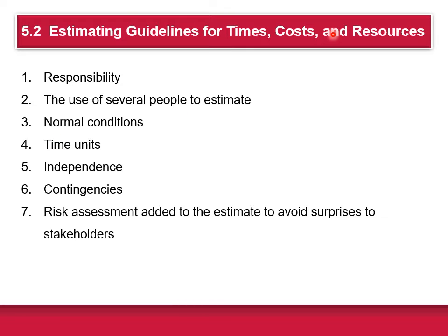Fourthly is the time units. Specific time units to use should be selected early in the development of the project. All time estimates need consistent time units. Estimates of time must consider whether normal time is represented by calendar days, work weeks, person days, single shift, etc. In practice, the use of work days is the dominant choice for expressing task duration.